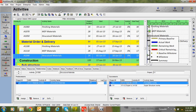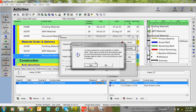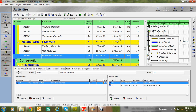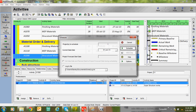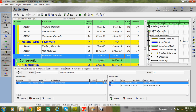If you want to give some lag — for example, two days — the material submission of shop drawings completes on 16th June, and after two days, on 18th June, the material order and delivery completes. You can also increase the lag to 10 days for long lead materials, since you need to keep in mind the lead time for those deliveries and allow more duration. This is how you can give a relationship between activities with lag.